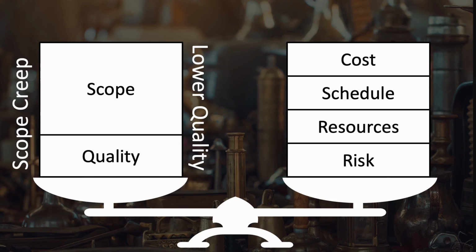This reduction in quality might not show up right away. This could be a very deceptive change to the project. You may not notice the quality problems until the project is done and you're dealing with an increase in warranty issues with the products. When it comes to software development, you're more likely to end up with code that is much less maintainable and very difficult to upgrade in the future.